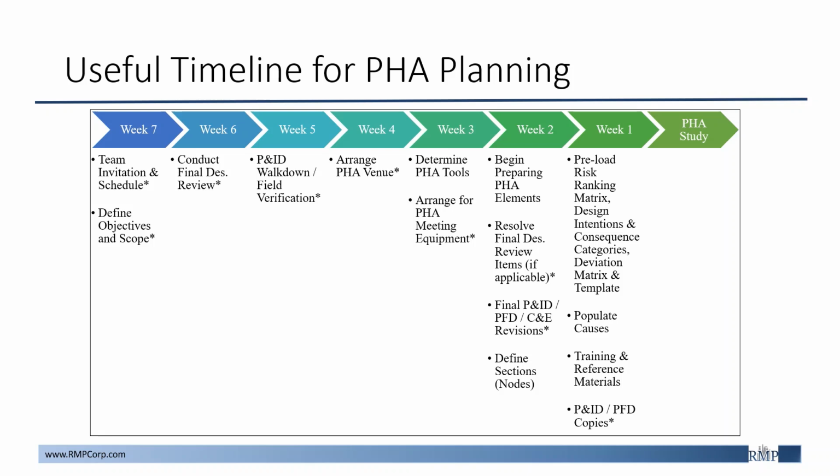It is also important to arrange a PHA venue well before the study date. This is because the location of the PHA can help improve the quality of the analysis. With ample space to perform the analysis and associated technology utilized to improve the quality of the session, the analysis can run much more smoothly compared to a last-minute venue that may have an insufficient number of monitors or possible connection issues that prevent key information being shown to effectively improve the flow of the process.